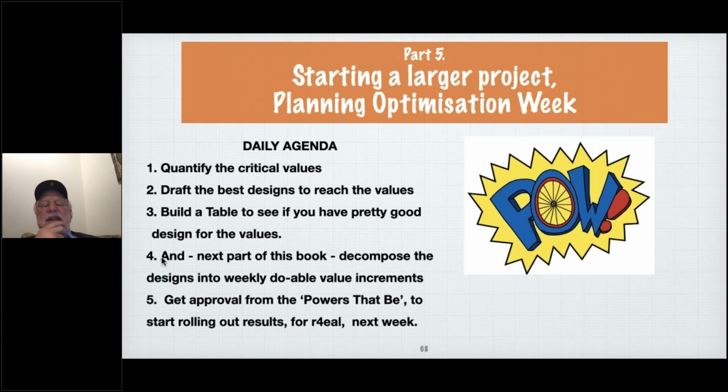And we start getting very agile because we start asking a very dramatic question. What can we do as some subset of this architecture or design so that next week, or at least next sprint, in a very, very large long-term project, sprint could be a month, not a week. What could we do next sprint to deliver some small component of our architecture so that at least one of our values went measurably forward?